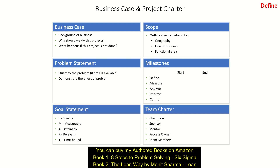The scope of the project should be defined clearly — what is in scope and what is out of scope. Milestone dates should also be given: the start date and end date of all phases. DMAIC has five phases: Define, Measure, Analyze, Improve, and Control. We should keep two weeks for each of these phases for a yellow belt kind of project. Then comes the team charter, where we have a champion, a sponsor, a mentor in the project, the process owner, and the team members supporting the project.